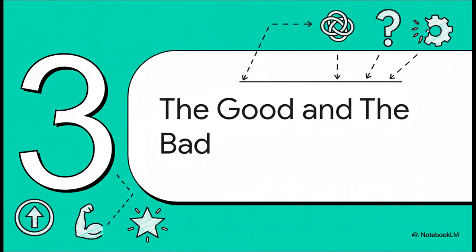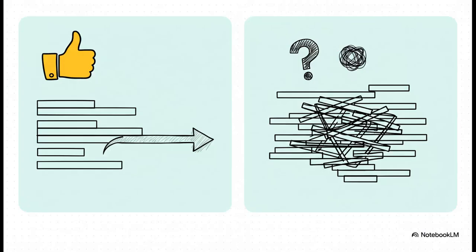But, like any tool, it's not a silver bullet. It's not perfect. To really get a handle on the Gantt chart, we gotta look at both its strengths and its weaknesses. Now this is where it gets really interesting. There's a fundamental trade-off here. The chart's greatest strength, its superpower, is its ability to visualize the entire workflow. But that exact same strength becomes its biggest weakness when a project gets too large. Suddenly, your simple chart turns into this impossibly complex web of bars, and it completely loses its clarity.